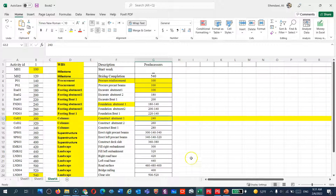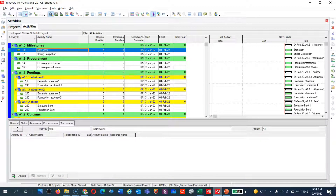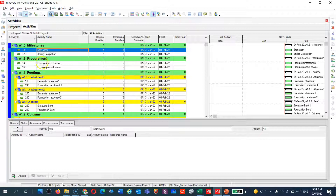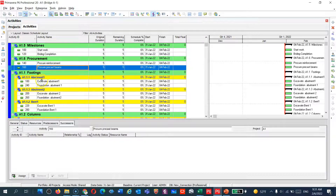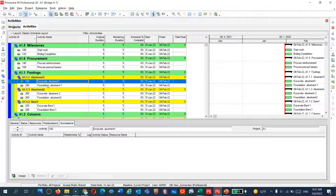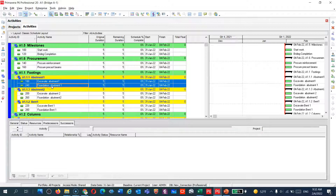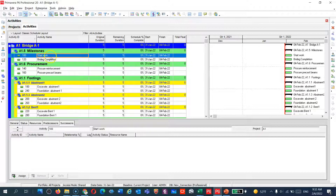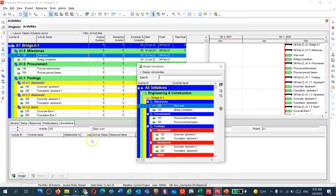Let's go to P6 and show you how to tie the relationships. Here is the schedule. You have 'Start Work' as a milestone giving a summary of the project, and here is procurement. To tie an activity, click on it and you'll see the predecessor and successor panel at the bottom. Just go and assign.